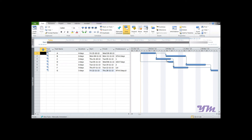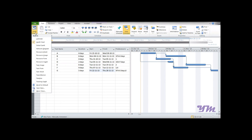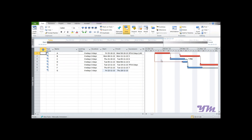The Detail Gantt Chart gives a much better understanding by highlighting critical activities in red color. Going back to the Detail Gantt Chart view, we can see that the critical activities — Activity A, B, and E — are highlighted in red, clearly identifying the critical path of the project.